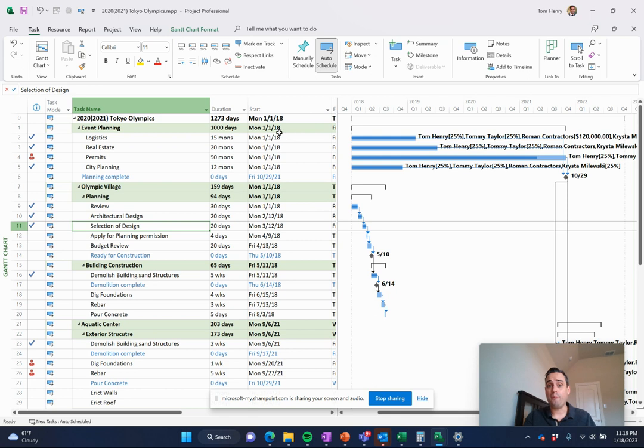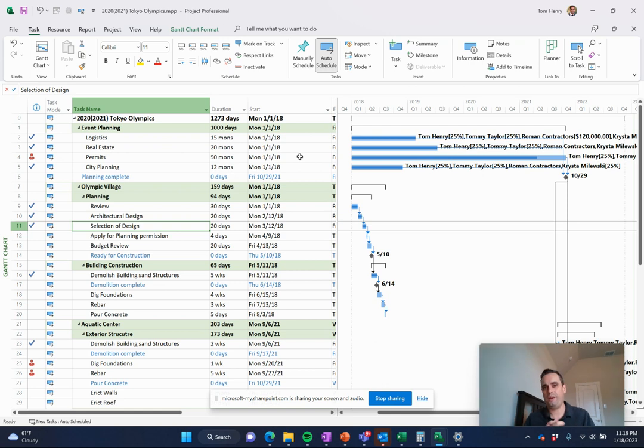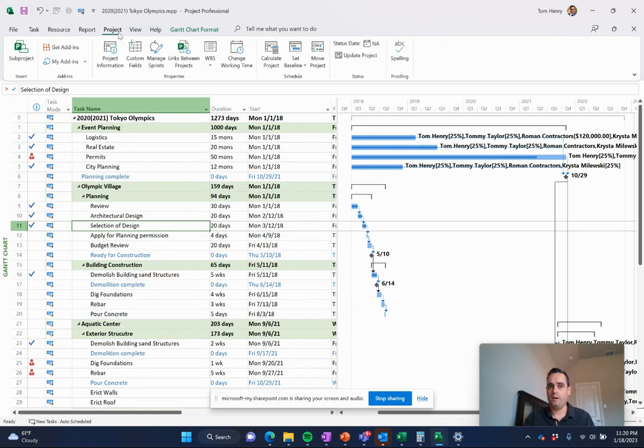You can also track in here baselines for those who like to keep up with where should we be by now? Are we on track compared to what we originally promised our managers? You can do that kind of stuff in here as well.